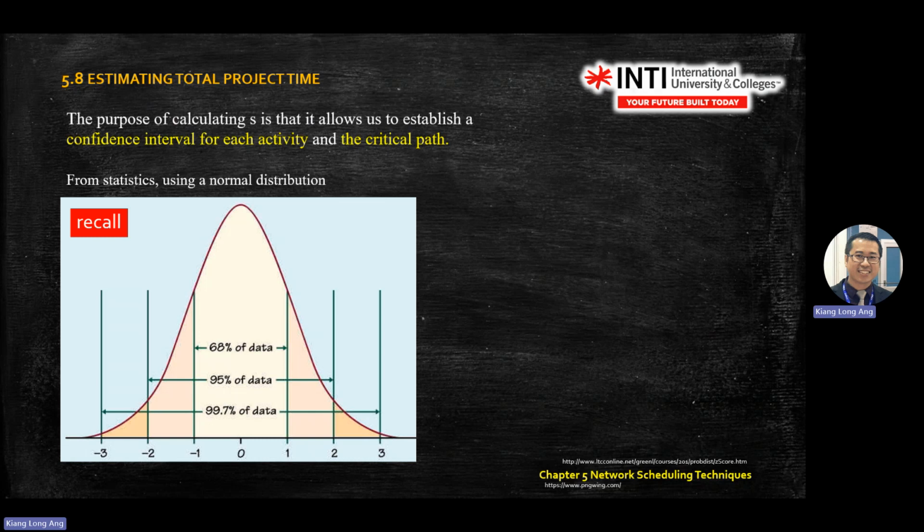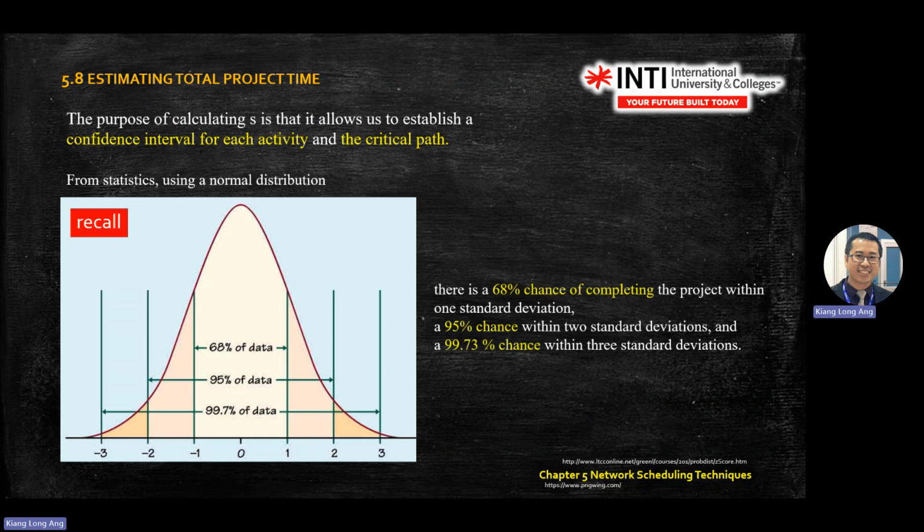You do prediction. This is a normal graph. So it depends on where your numbers are. The example that we saw previously is, let's say the production is 25 days and you promise the customer 30 days, means the confidence level is on the right, the positive side, plus the 50%. If you promise a date less than your network, it will go to the left-hand side, then you calculate the area on the left.